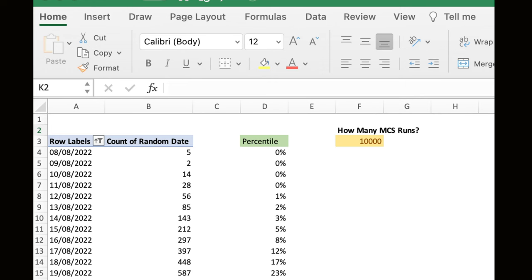Putting it all together, here's where to use lean flow metrics in your Scrum ceremonies. The aging WIP chart is great at the Daily Scrum — it helps focus conversations on the right thing and keeps you on track. Throughput is fantastic for sprint planning, helping you understand how many things you can take into sprint and actually get done. The Monte Carlo forecast is great at the sprint review — update stakeholders on progress and discuss whether you're happy with the agreed probability. And at the sprint retrospective, it's a great time to reflect on cycle time, flow efficiency and throughput — are we in good shape, or do we need to identify and fix handoffs or bottlenecks?